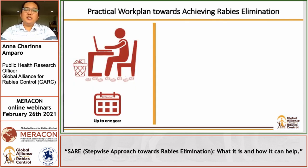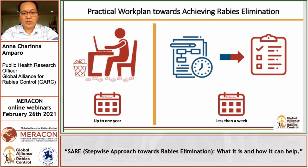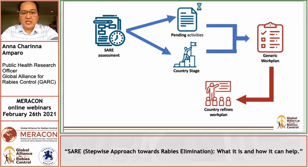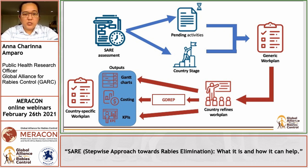Regarding the practical work plan: typically when we think of developing rabies work plans, we would think of at least a year's worth of meetings and workshops. One major advantage of the SARA assessment is this process would take only about a week. The practical work plan towards achieving rabies elimination automatically generates a work plan based on the completed SARA assessment. Based on the pending activities and the country stage, we have the generic work plan. The country will then further refine this work plan, after which it will have Gantt charts, costing, and key performance indicators or KPIs. There is also the GDREP, another tool developed by USCDC that will help in estimating costs of a rabies program, resulting in the country-specific work plan.